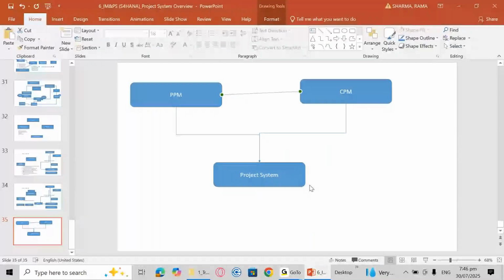One is manual integration, and another is automatic integration. Manual integration means you have a PPM object and a project system object. You can create these objects individually in these modules, and assign the object of one module to the other. For example, when integrating PPM and PS, you can directly assign a project definition to a PPM item through an object link.